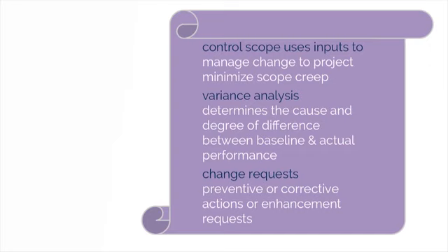Please note that if the approved changes have an effect on the project scope, then the scope statement, the WBS, and WBS dictionary will need to be revised and reissued to reflect the approved changes.